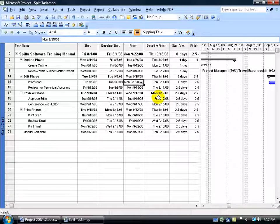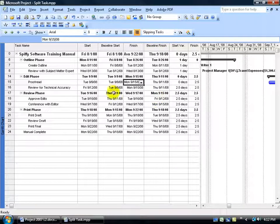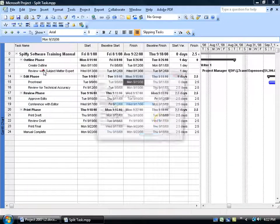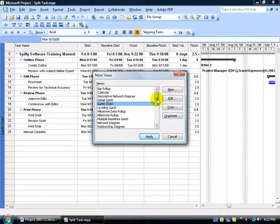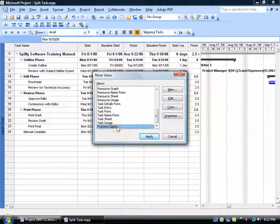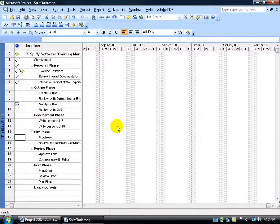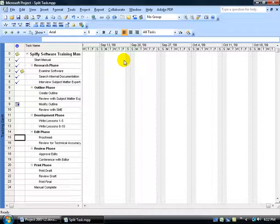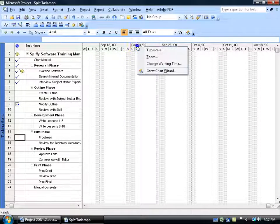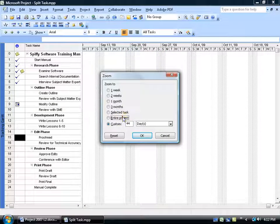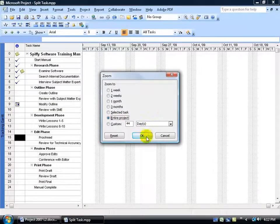Let me go ahead and change it to the Tracking Gantt. I'm going to come up here, click on View, go to More Views, scroll down to the bottom here, double-click on the Tracking Gantt. Of course, if I cannot see my Tracking Gantt chart, I can right-click on the timescale here, go down to Zoom, select Entire Project, click OK.